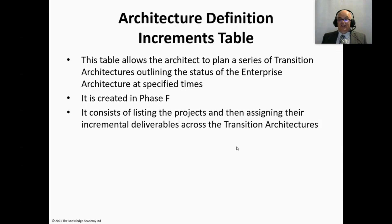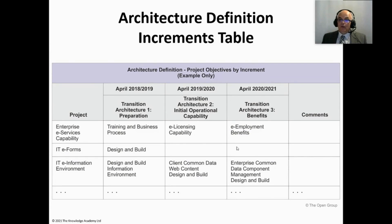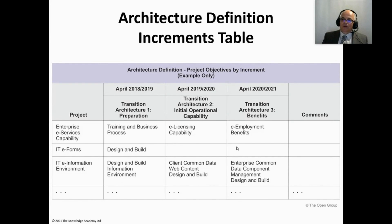The architecture definition increments table allows the architect to plan a series of transition architectures, outlining the status of the enterprise architectures at specified times. Created in Phase F, it consists of listing the projects and then assigning incremental deliverables across the transition architectures. It's a bit of a chicken-and-egg situation: you define the transition architectures and state what the deliverables will be at those points, but you're also defining the transition architecture points based on the completion of certain work and delivery of key deliverables.